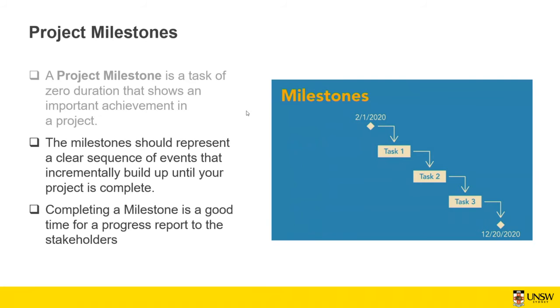You have a few milestones within your project, which can be based on timeline. You may want to put milestones every quarter or something like that, and based on that, you manage your tasks and duration. Or it can be based on when a specific element of your project or a specific delivery is completed and ready, and that can be one milestone. You have a few milestones in your project, not just one, and the combination of these milestones gives you the final objective of your project.